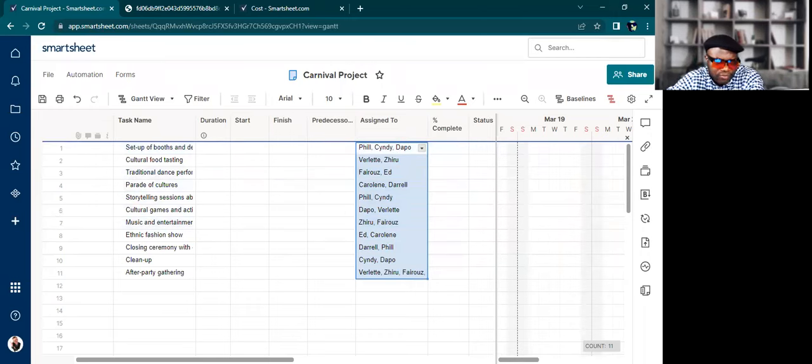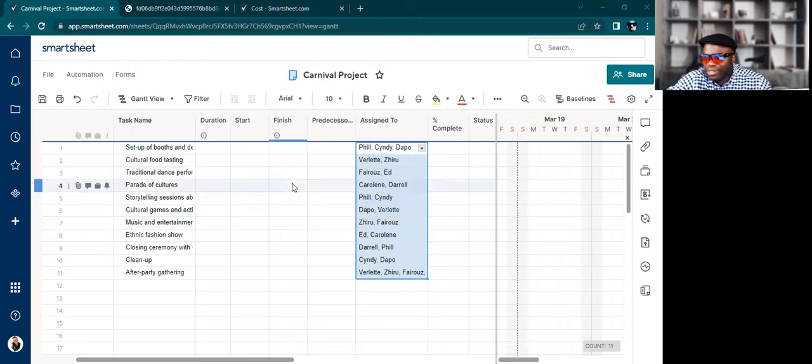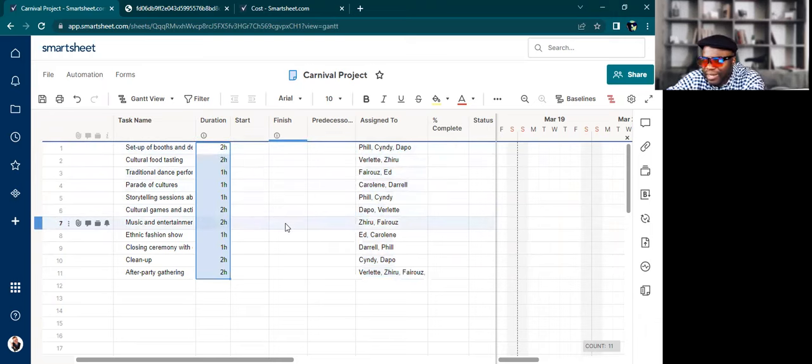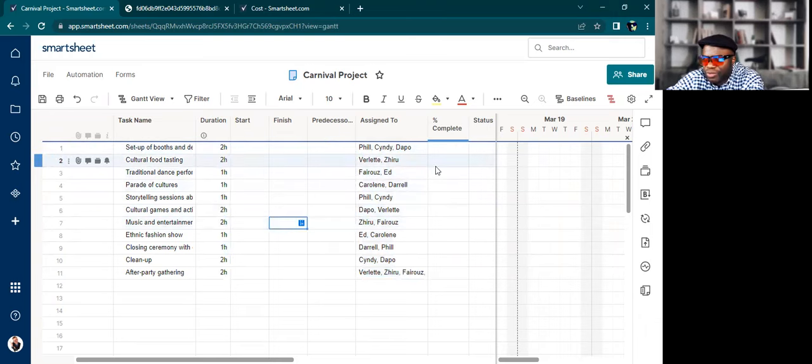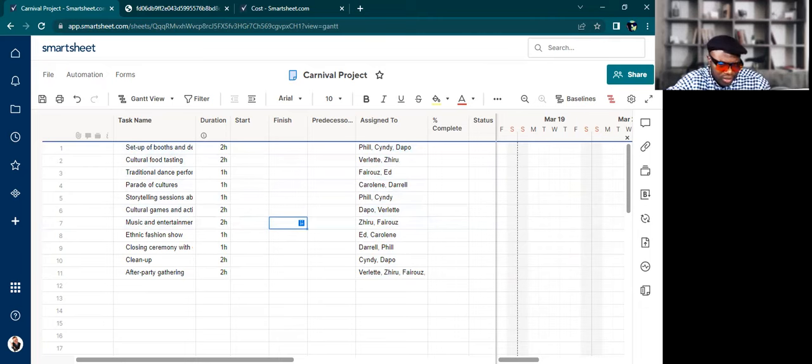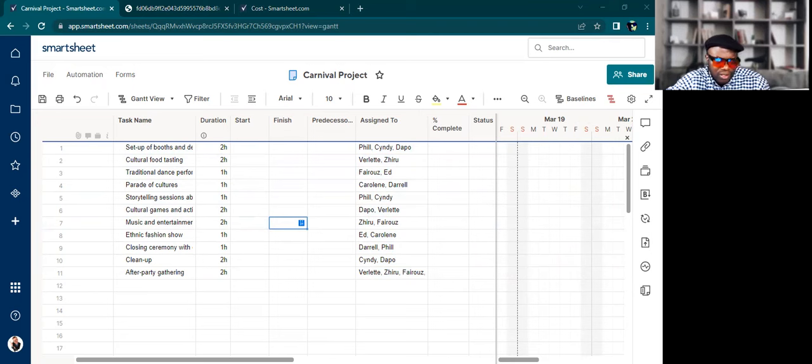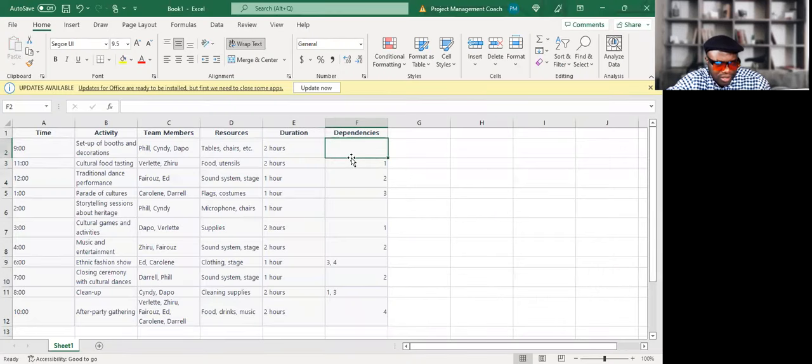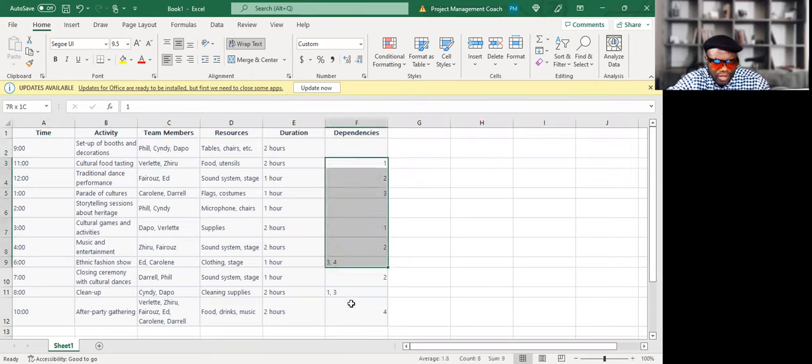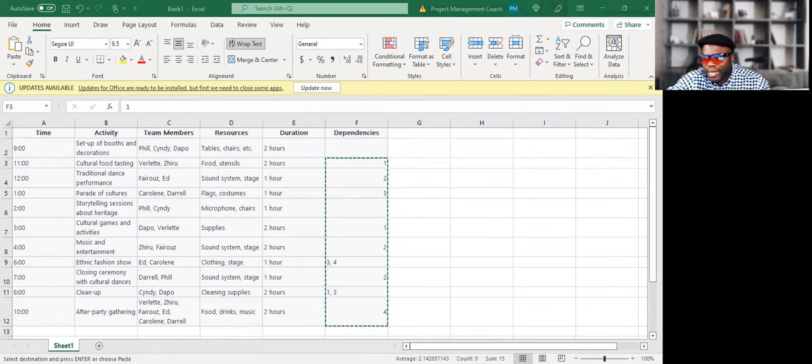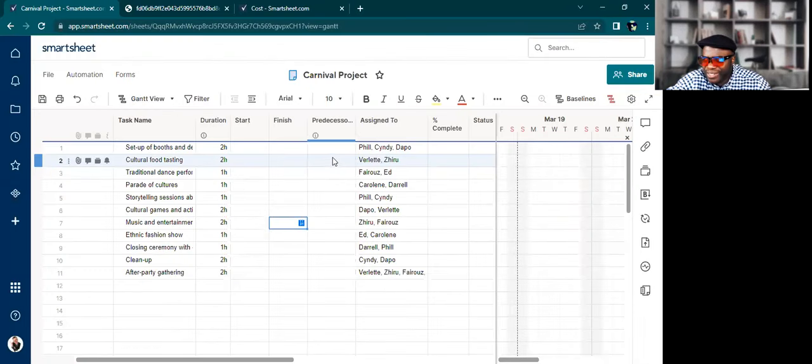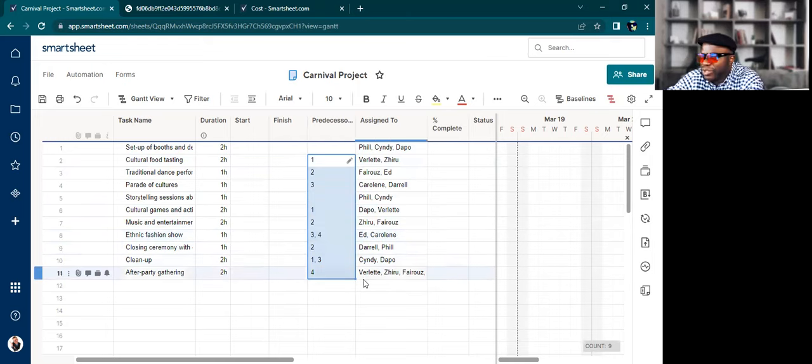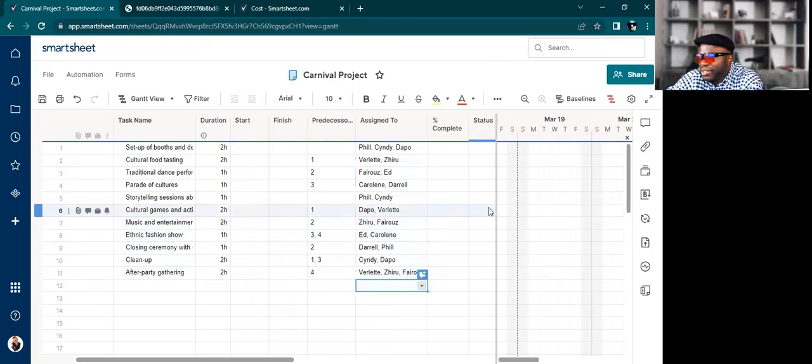In terms of the duration, it's suggesting hours. I'm going to take that. I'm going to put the dependencies. It's so clever that it knows this is line one, and it knows line two is dependent on line one. I'm going to take all this stuff, go back into Smartsheet, and just paste it in. As far as the storytelling sessions about heritage, it does not have any dependency.